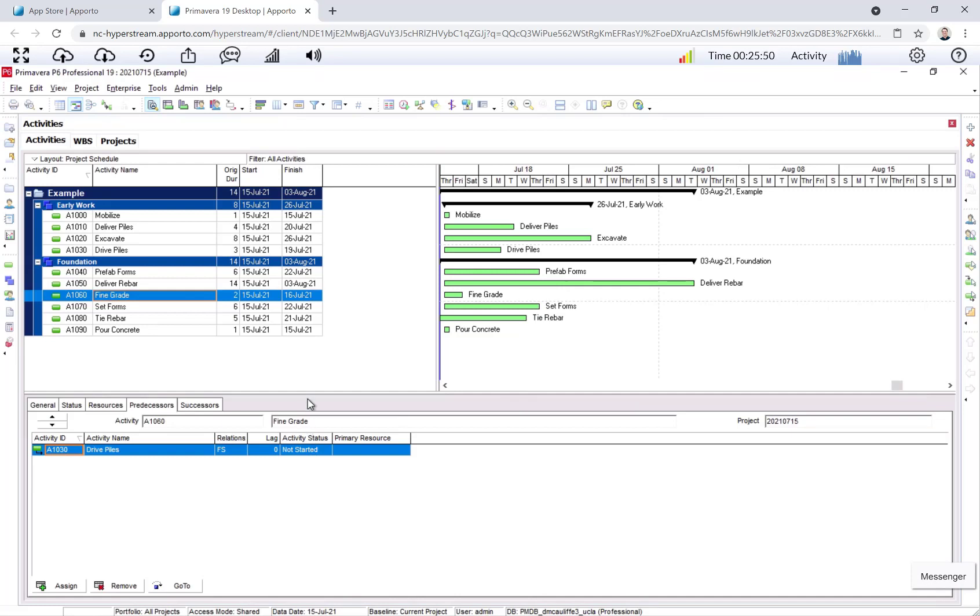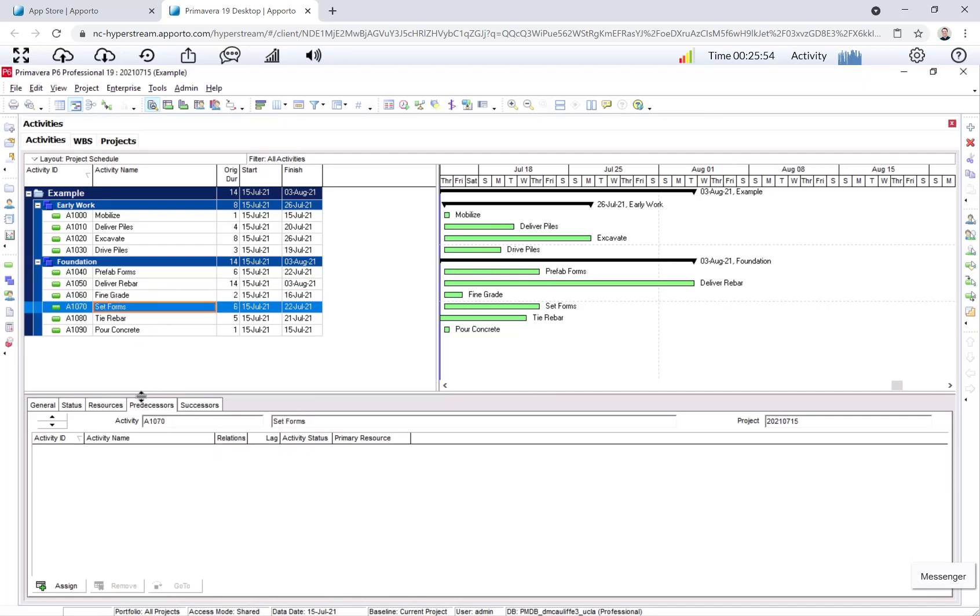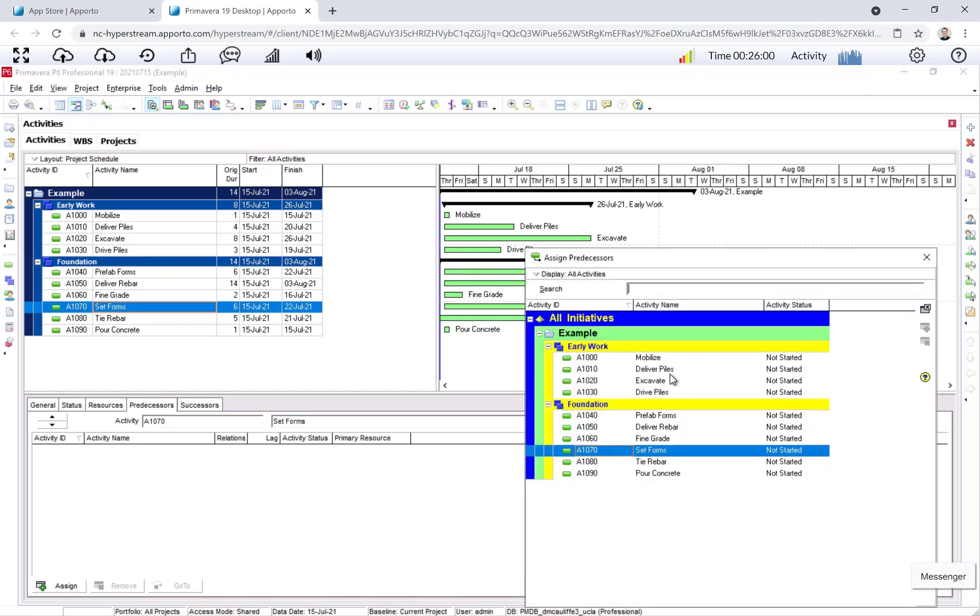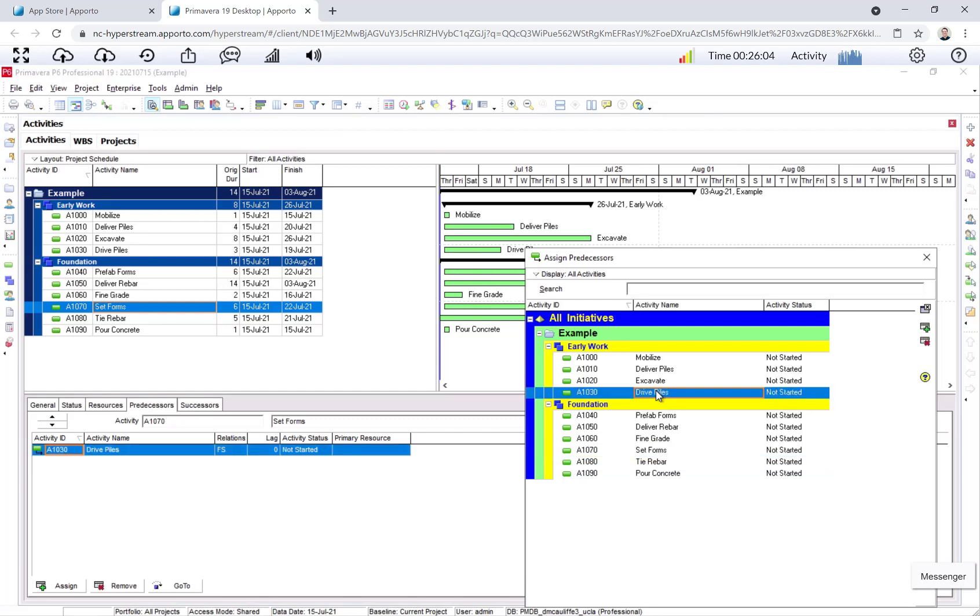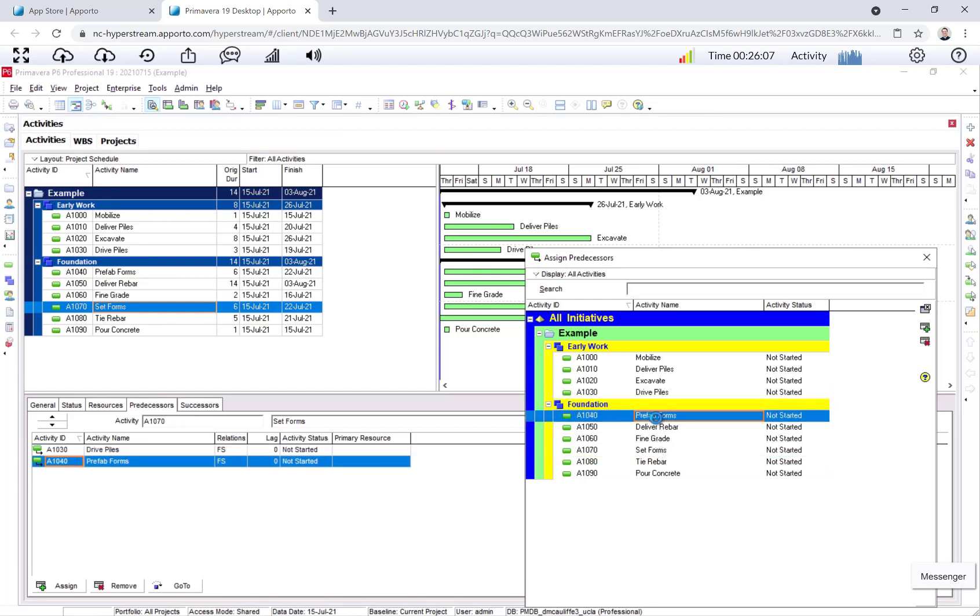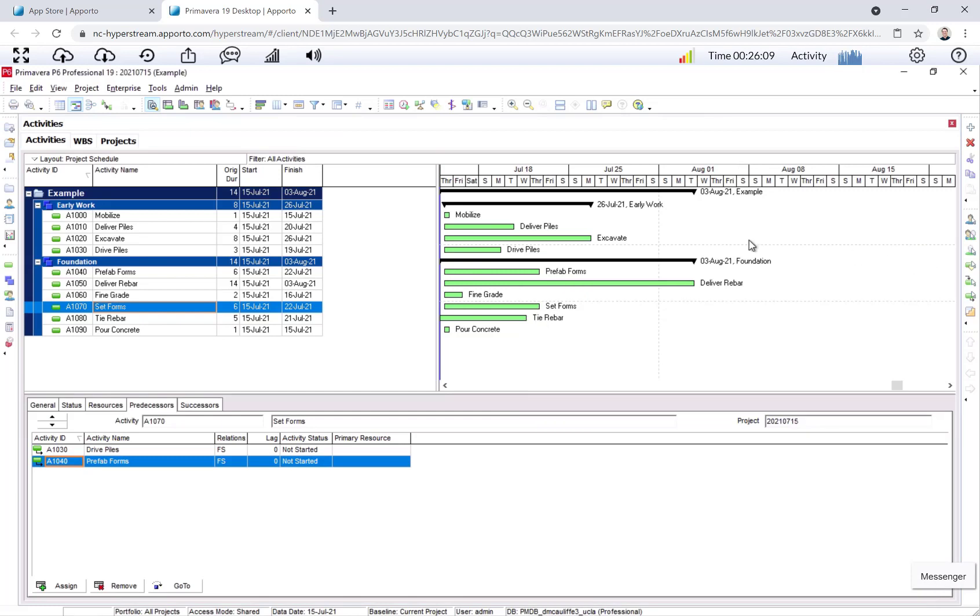Let's go to set forms. I have two predecessors, drive piles and prefab forms. Assign, drive piles and prefab forms. Okay, finish to start, all good.